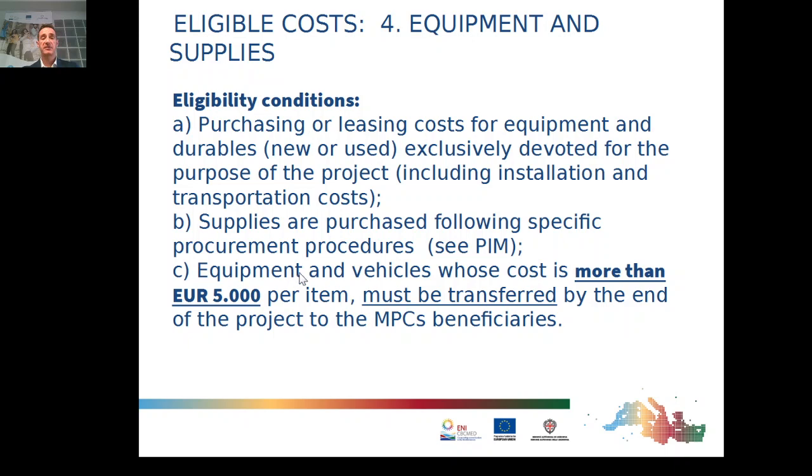And finally, a specific rule from this program: equipment and vehicles whose cost is more than 5,000 euros per item must be transferred by the end of the project to the Mediterranean partner countries' beneficiaries. And this is important to consider when drafting your budget.